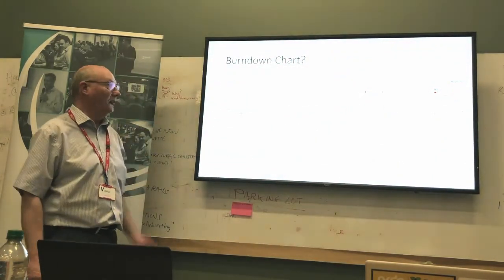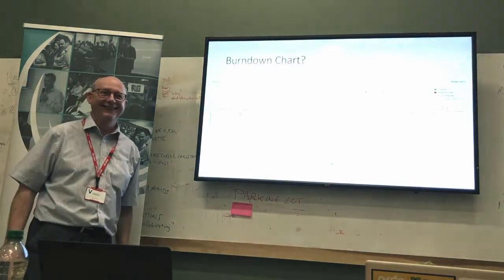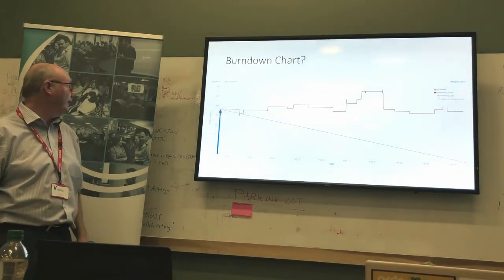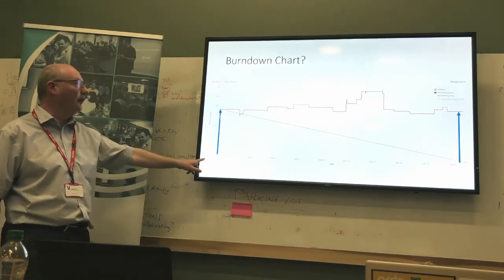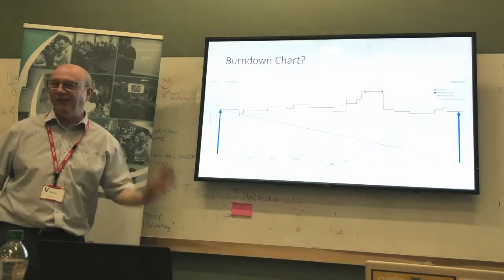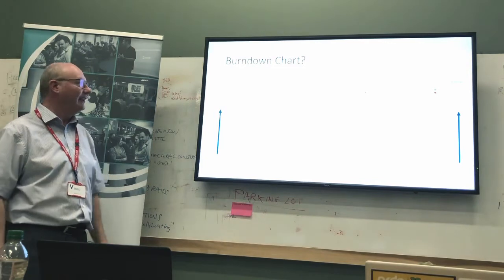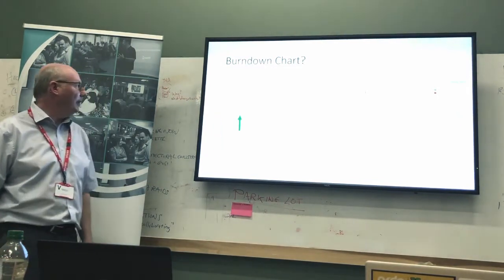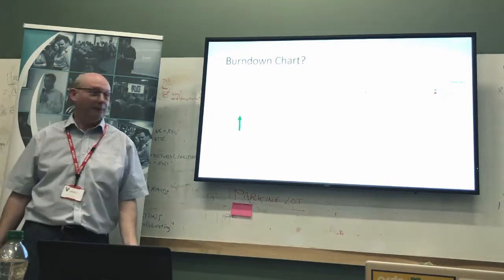Okay. What about this one? Throw that one away. What happened there? That looks a bit more typical. Scope breakdown on it. I mean, okay, so look, this arrow here, I duplicated it and then I moved it over to there. And it looks as if we've got exactly the same amount of scope undone at the end of the sprint as we had at the beginning. So what happened in between? Did we actually burn some points, or did we just de-scope something?